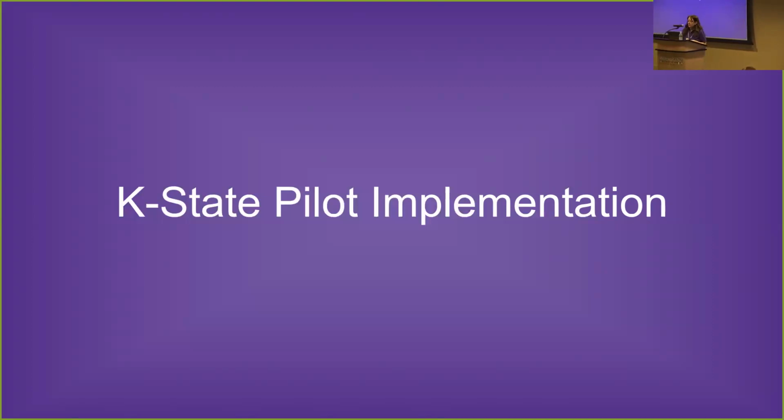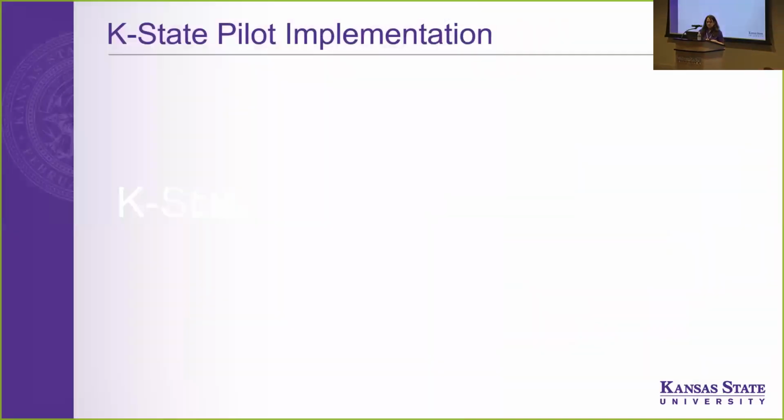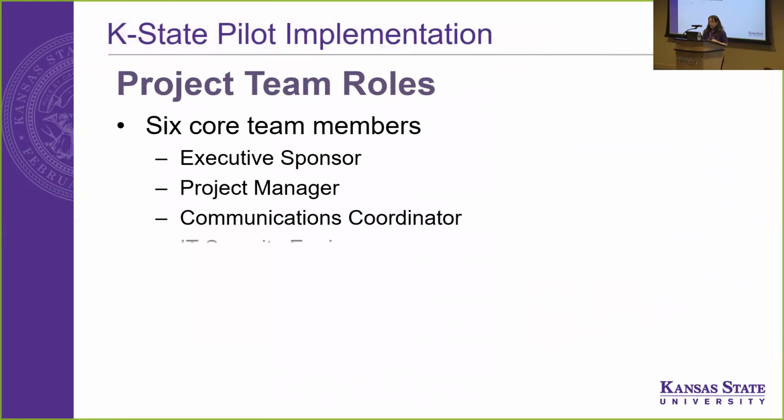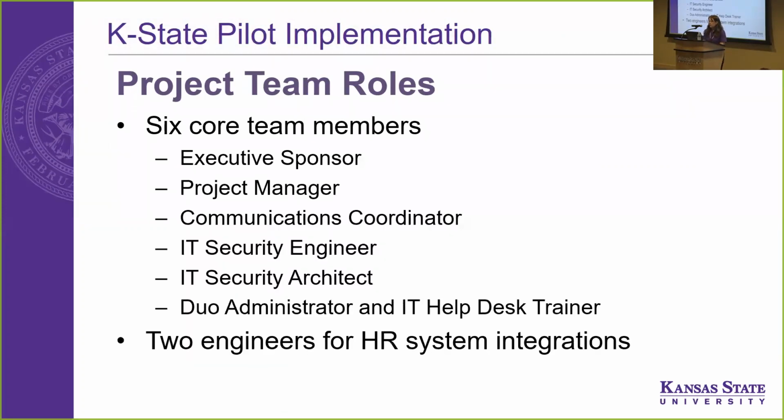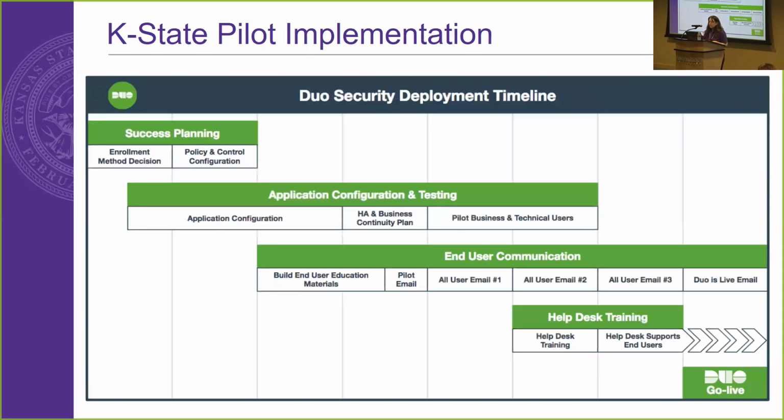So next I'm going to talk about our pilot implementation. I wanted everyone to know the project team had six core team members, so not a large team, just six, and then two engineers from HR did some part-time work for the direct deposit. Duo provides a liftoff guide on their website, and they provide a lot of documentation to help the team, including help documentation and project management information. So we followed the deployment timeline off the liftoff guide, and it really helped us with our implementation.